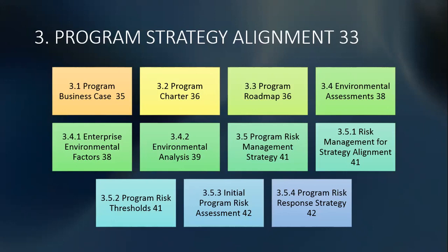Then we have the program roadmap. The program roadmap is a chronological representation of a program's intended direction, and it graphically depicts dependencies between major milestones and decision points. And if you take a look at page 37 in the standard for program management, you see an example of this. It shows you the waves. You've got wave 1, a decision point. Within wave 1, there was project D, then wave 2. Within wave 2, you've got project E and J. And it shows how all of these projects taper in to the overarching program and how it spans across a period of time, period 1 to period N.